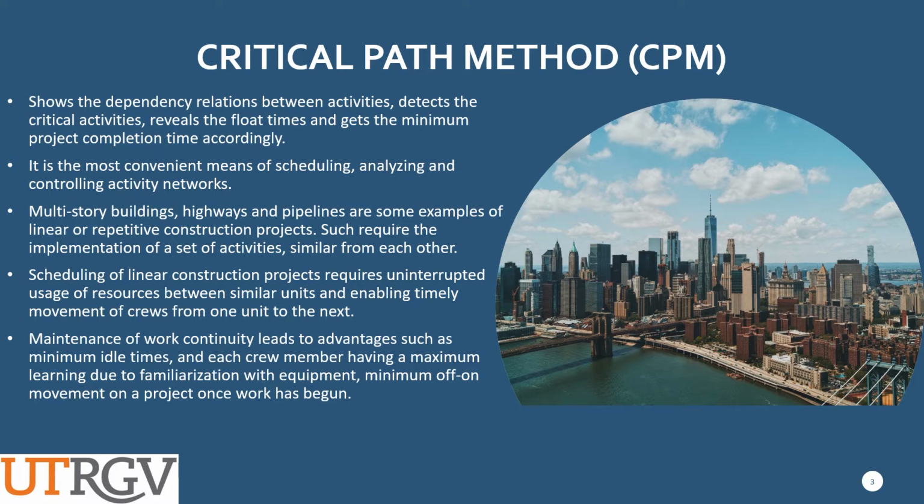The maintenance of work continuity leads to advantages such as minimum idle times and each crew member having a maximum learning curve due to the familiarization with the equipment. It also allows the minimum movement of equipment, as it is cheaper not to move the equipment.